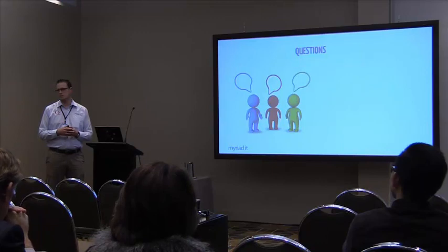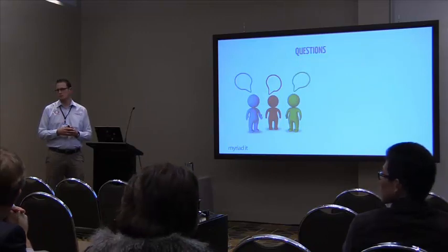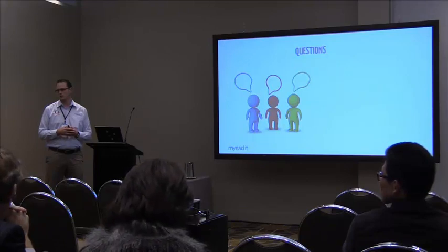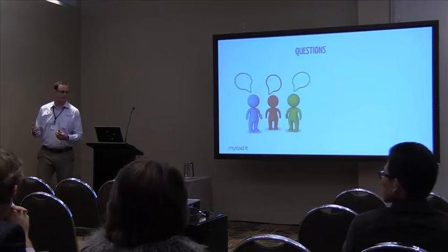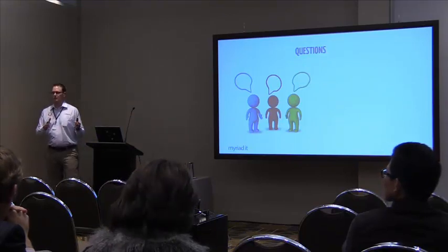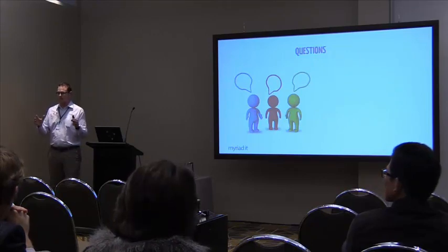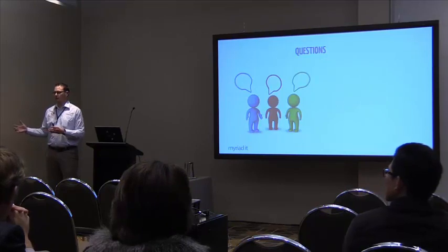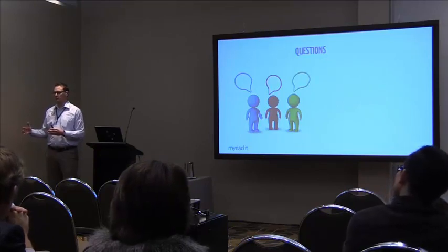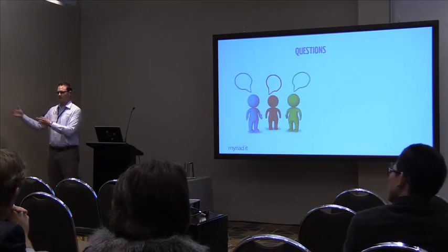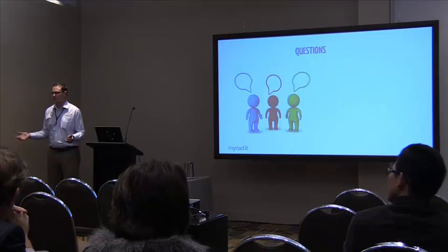No? Cool. I know you have big ranges at each end, but the 100-day upgrade, is it usually less than 100 days, more than 100 days? It all depends, Darren. We've had people do it in 60 odd. We've had people take the methodology and go, yep, that's the framework we're going to use. But we know that Christmas is coming up. We're going to shut down for 6 weeks. Because of that, we're just going to get to this phase, please stop, park for 6 weeks and we'll start back up. So it may turn to 120 days. But that's a decision they made.